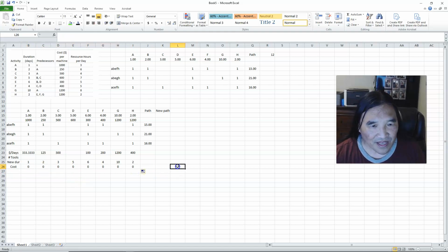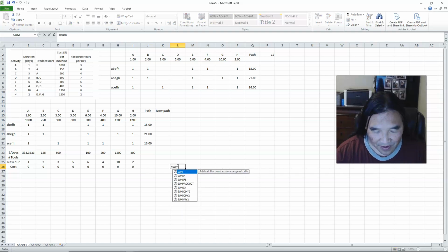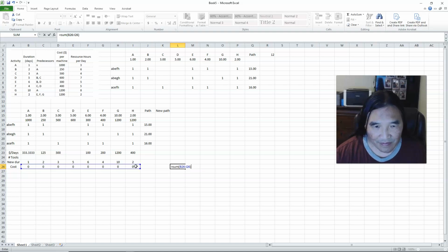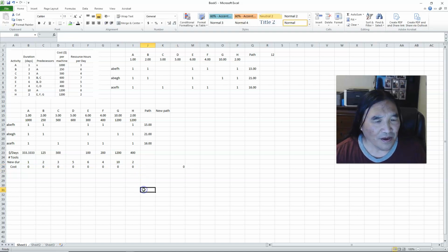And we'll put that total over here, how much money I'm going to end up spending. So what do I do now? Well, look at this. Where are the lowest costs? Well, it's at $100. So let's buy one of these guys. And I get a lot of bang for my buck because 6 now goes down to 3.